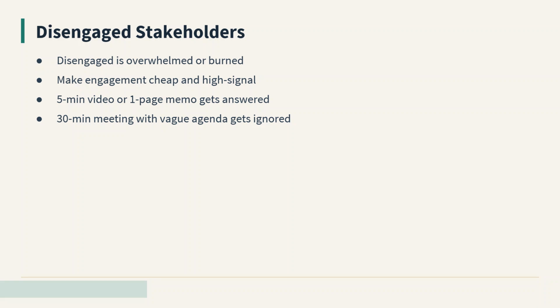Disengaged stakeholders are not hostile. They are overwhelmed, or they do not see the project as relevant to their priorities, or they have been burned by prior projects that consume their time without delivering. The fix is to make engagement cheap for them and high signal.